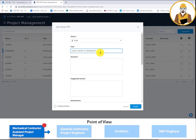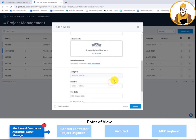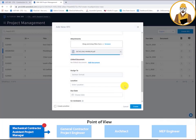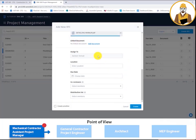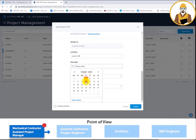And attach either a file from your computer or a file that is already in BIM 360. Once the assistant project manager enters in the location as well as the due date, the assistant project manager creates the RFI.